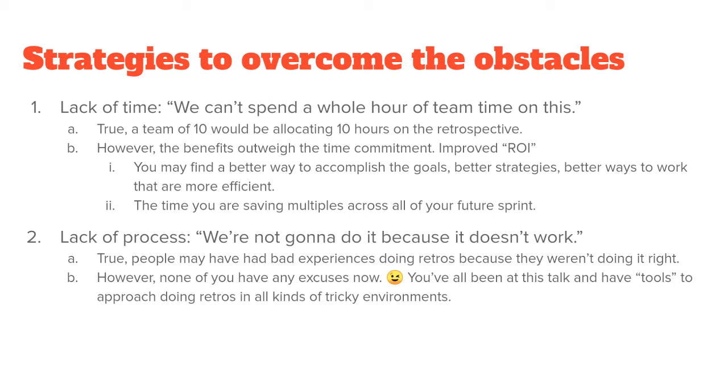Okay, so we're kind of breaking down some of these obstacles and talking about specific strategies. I know at my company, lack of time is a really major thing, and I'm sure that's true at a lot of other companies, because you talk about getting a whole room full of engineers together, and management's thinking, gee, that's a lot of cost, everybody could be putting extra hours into project X, right? So a team of 10 is allocating 10 hours on the retrospective, if everybody's in the room for 1 hour. But what we're trying to focus on is, what are the benefits of that? Do we think about how the benefits are going to outweigh the time commitment?